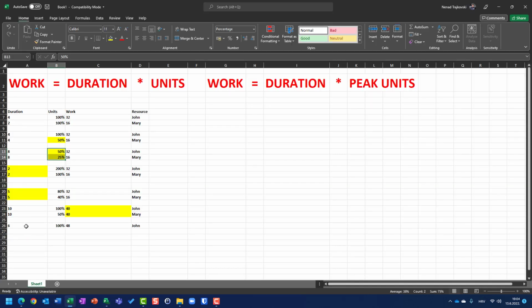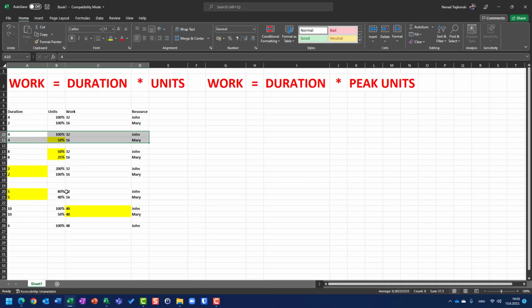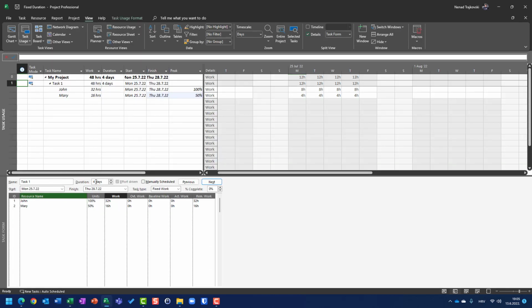Now, let's say that I have here a situation like here, okay? 4 days here, 100%, 50%, 32, 16, which you can see. And now I will say, okay, but I want the duration to be 2 days. Remember, those 32 hours and 16 hours are fixed. So what is going to change? I will click on OK. So those 32 hours and those 16 hours should be fulfilled in 2 days.